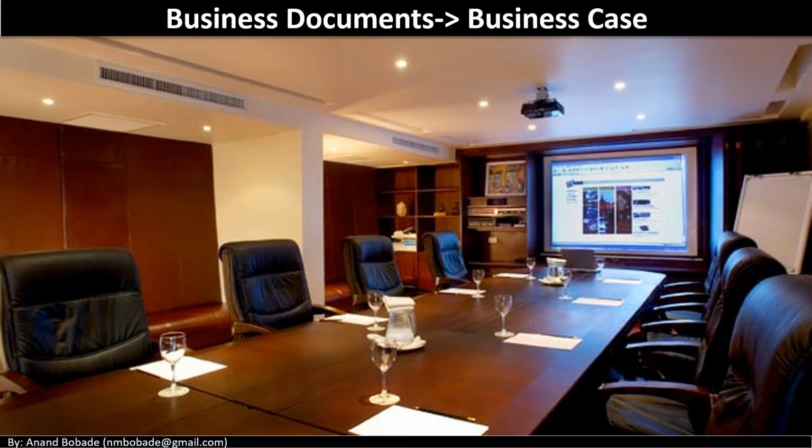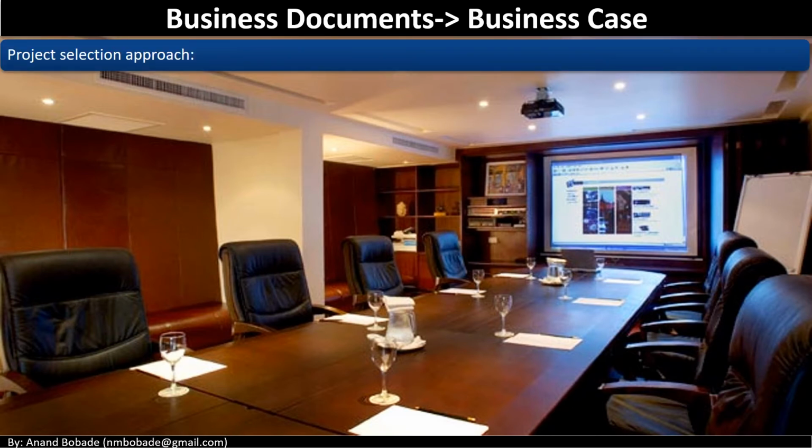Consider a scenario where an organization has been handed a number of project contracts. Due to resource constraints, the organization can't handle all the projects at once. So they need to decide which projects will maximize profitability. So the business case will be presented in a board meeting to take a decision. Some business cases will be approved and some will be rejected. This is where the project selection method comes into the picture. There are two types, benefit measurement method and constraint optimization method.